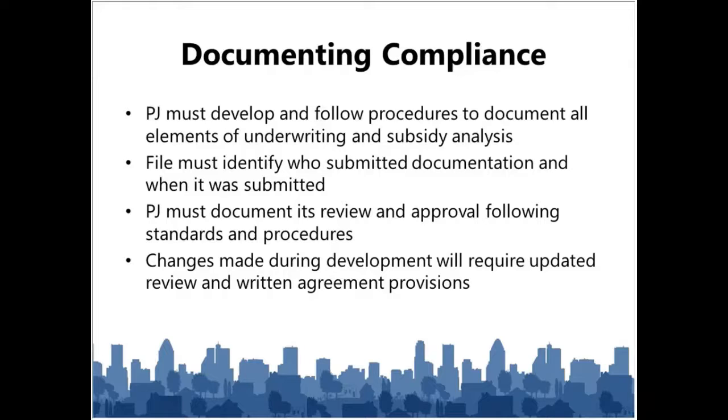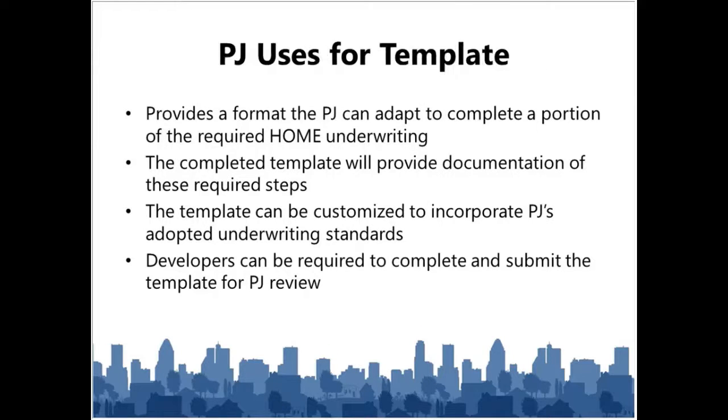You may need to be revising that funding agreement, and you may have to go back and re-underwrite to make sure that with changes in that budget or the program design, that project still meets these requirements. That documentation needs to be part of that file also.